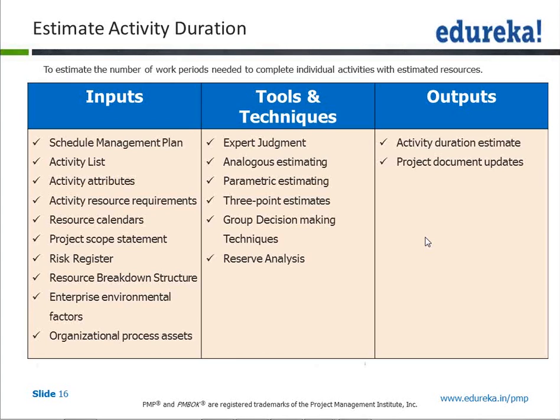When you start for the first time in an organization, generally you will use guesswork from your experience. But as you start using a project management process, you will start putting these values, how you calculated in each project, in your project management information system. So next time when you have to estimate, you will take the data from the previous estimates.